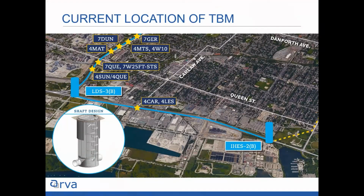And in terms of the current location of the tunnel boring machine, as of November 18th, because that's when I finished looking, the tunnel boring machine is at, I guess, this bridge here, Eastern. And that's about 3 kilometers of tunneling, and there's 7.3 remaining to go. And NTC noted to me that the best day of tunneling was 40.5 meters in 2 10-hour shifts, which is pretty impressive considering that the bore is like 7.3-ish meters. So that's pretty darn good production.